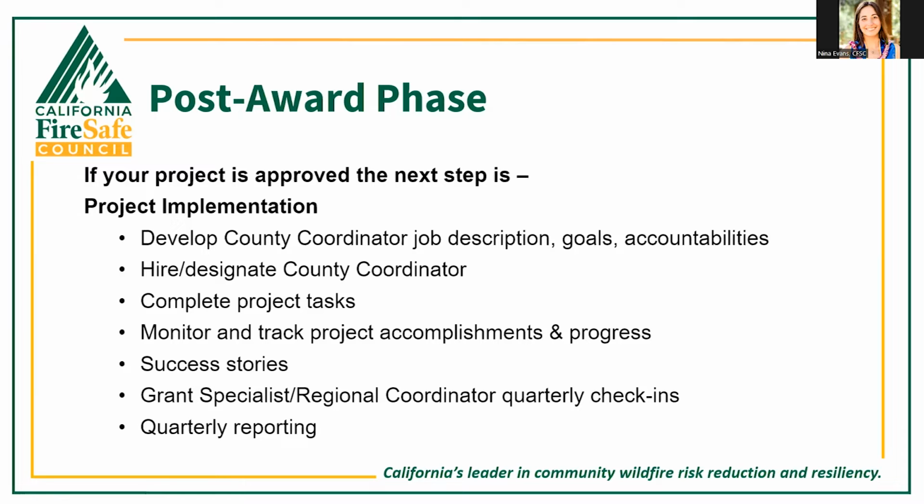And so at this phase, it is now time to dig in and develop your final county coordinator job description, their goals and accountabilities, hire or designate them, complete your project tasks, monitor and track project accomplishments and progress, including collecting success stories from your project, and identifying any recommendations, suggestions, successes, and challenges to share with other future grantees. And at this phase, it'll also be when you are checking in quarterly with myself, Julia, or our regional coordinators. And in addition to these quarterly check-ins, you will also be required to submit quarterly progress and fiscal reports.